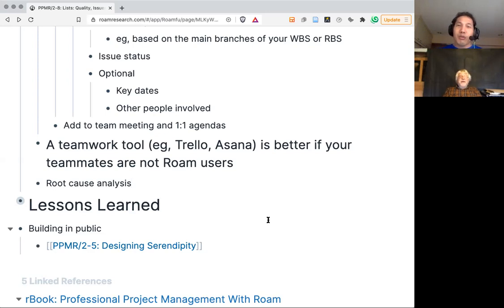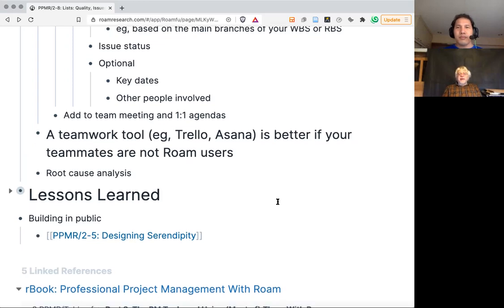So how do you normally fix that? You do another project, or you just assign it as a part of the ongoing support or operation? It depends. If you are the owner of the project and the team, it's a never-ending project. That's one case. If it's for a customer, you try a divide and conquer approach. You sit with the customer and you say, okay, we have these issues. We have to list which half of them we will do, and which half we will not do. So you have to choose which ones you abandon.